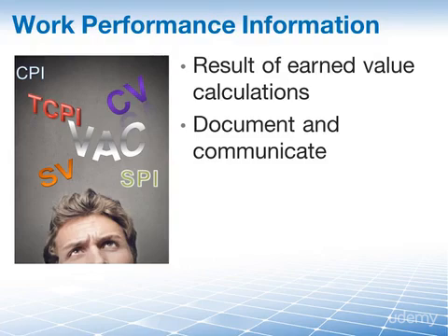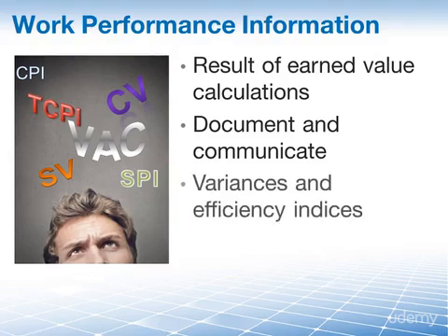What is important to know right now is that the work performance information represents different variance calculations and efficiency indices for both cost and schedule. For instance, we want to know what the cost variance is. How much are we above or below our baseline?